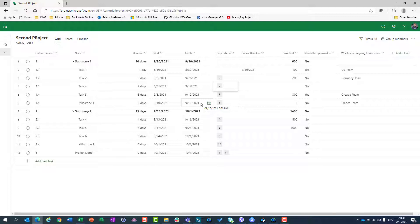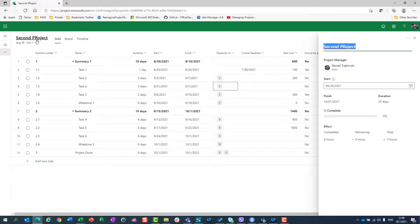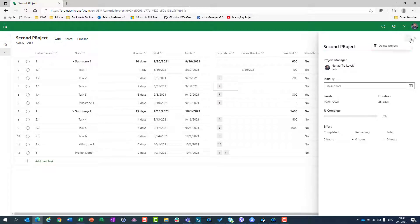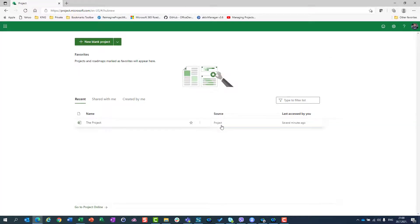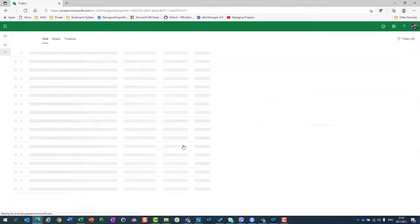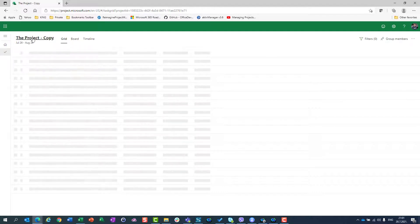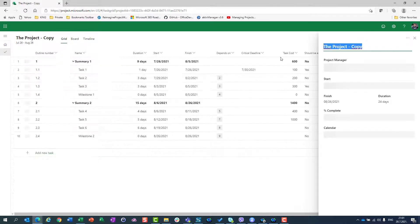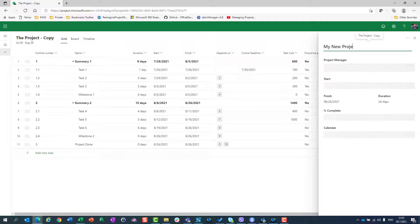If I need a blank project with custom fields and don't want to recreate them from scratch, I can do this. First, I'm going to delete the project. I'll go to my project here and copy project. I'll rename it to 'My New Project.'